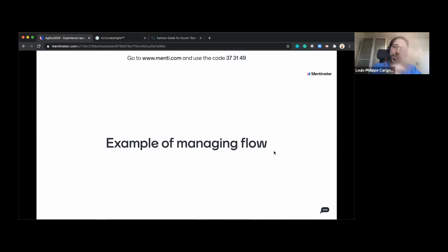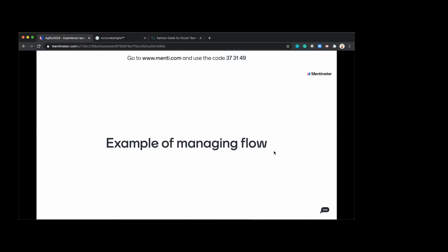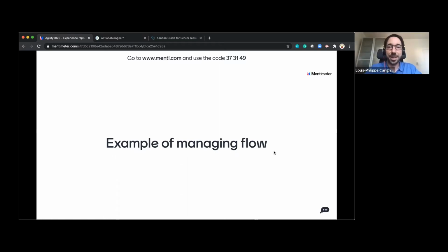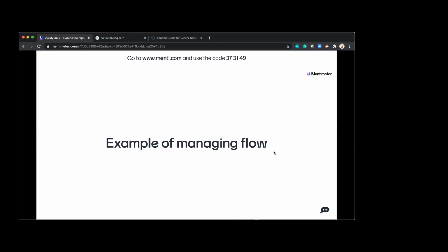No, scrap estimates. When I'm talking about cycle time, it's start a timer when you start working on that card all the way until it gets to done, or whatever is your last column in your workflow. Completely ignore estimates. So you're saying that's different, both will definitely be different, because one is an estimation and one is the actual thing that happened. Exactly. So that's why I would be more advocating historical data to make decisions. And when you go back to the Scrum framework, it's all based on empiricism, on facts. And I prefer using real historical data for facts compared to estimates, which, yes, are facts, but they're estimates at the same time. Okay, got it. Yeah, thank you.